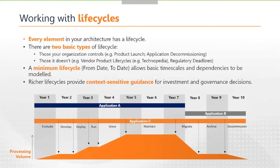Every element in your architecture — be it a technology, a process, a business product, data, or applications — regardless of which area of the architecture you're working in, every element potentially has a life cycle. You can categorize these in different ways, but I like to categorize them into two categories: those things that your organisation controls, like a product launch or the decommissioning date for an application; and those things it has no control over — life cycles which are simply imposed on you, such as vendor product life cycles, for example when a particular version of SQL Server goes out of support.